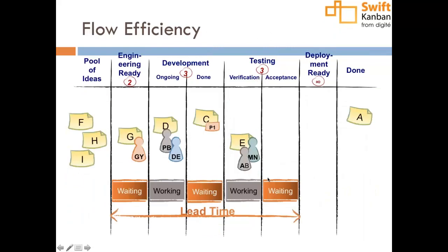All right, so the other aspect of it, which in this case the audience today is using, is flow efficiency. Quite a few of you are using flow efficiency. In case you haven't, this is also a measure that provides great insight into your system. The flow efficiency looks at the overall lead time or cycle time on the board, and the wait time versus the work time, the stages that are built into the overall flow. And it then provides a ratio of